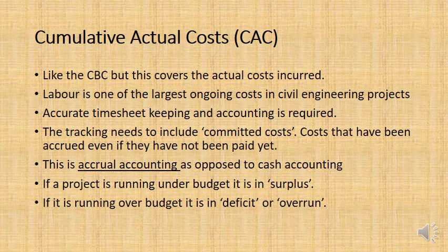cost budget, total budgeted cost, cumulative budgeted cost against capital, and you're thinking we're fine, the orange line is above the blue line. But then suddenly at the end of the month, you have hundreds of workers coming up to you saying it's payday and we've all worked overtime and now you have to pay us a lot more. You owe us a lot more than what you budgeted. Suddenly you could actually be failing the liquidity test.